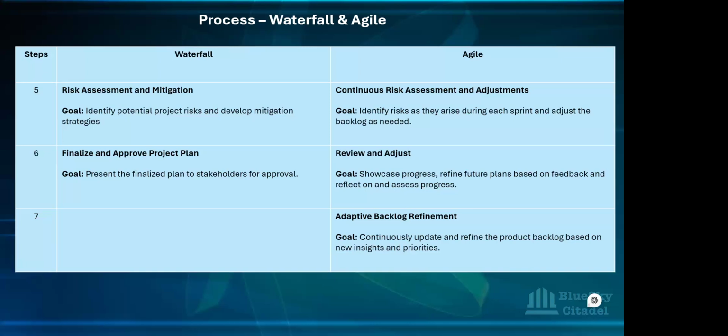So you might put a mitigation plan in place to say, let an extra developer be on standby. It might be a case where you have a recruiter that you can get a temporary developer from, and then you put that into your costing. So you have some reserve that you have put in place, so that in case there's an emergency for any of the resources that you're using, there is a standby, a temporary person that knows about this thing, that we can bring on board to do things.